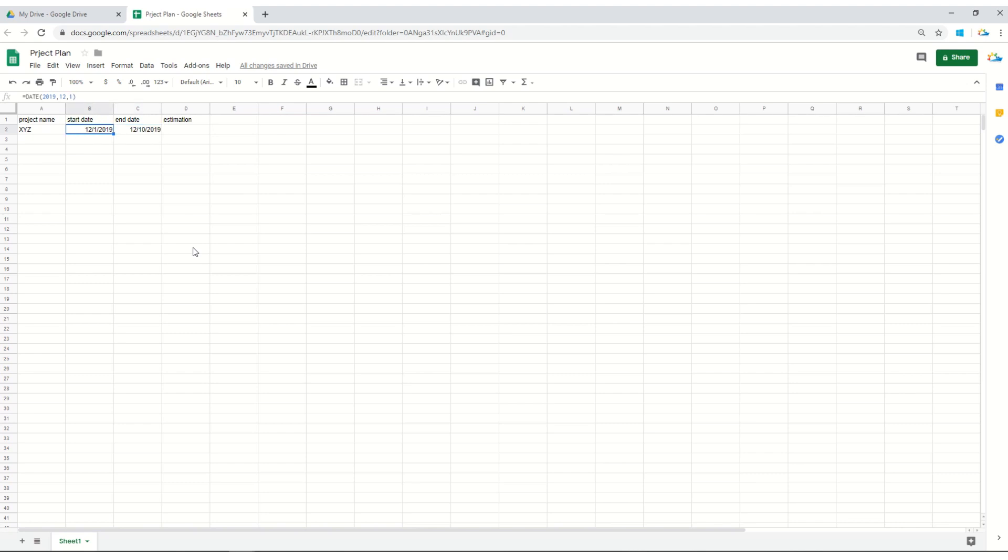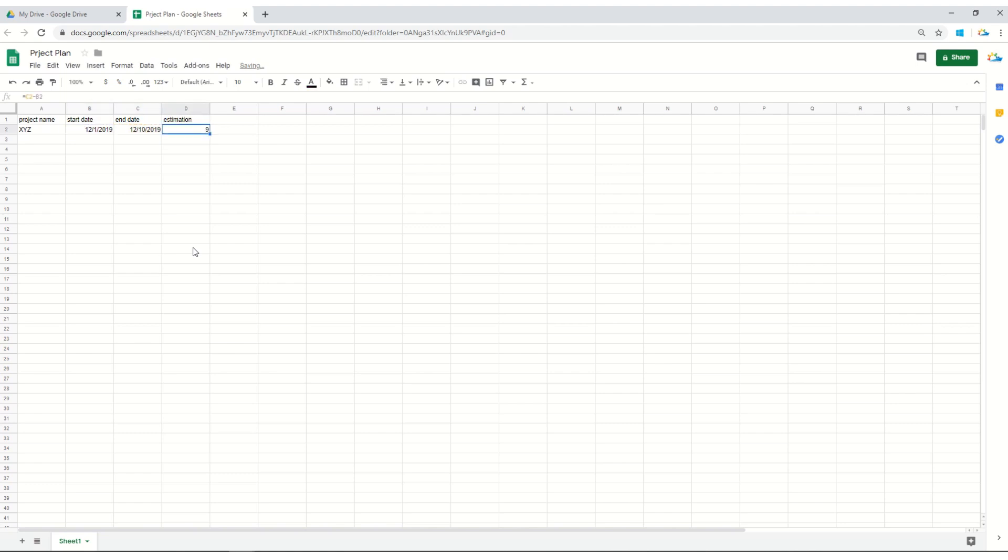If we are using the same format, the estimations can be calculated easily by using the subtraction sign. Let's see how: use an equals sign, then select the ending date minus initial date or the starting date. See, it tells me that the project will actually take around nine days.